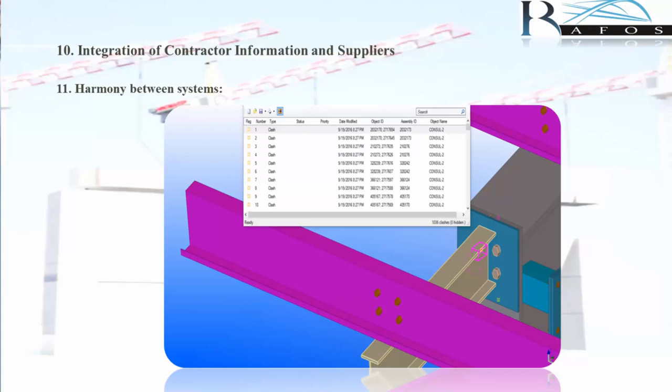Obviously, identifying component interactions before the start of construction operations will lead to a lot of time and cost saving. In the clash check section, because of the visual reality of the computer-generated model, all of the administrative problems are identified before the start of the project. As an example, there is a short distance between two bolts that cannot fit the wrench, or many different problems that may happen in the execution of projects.